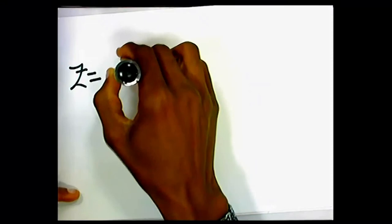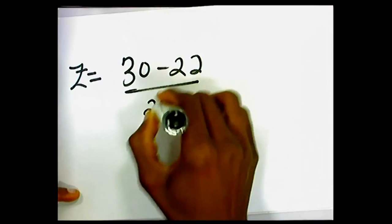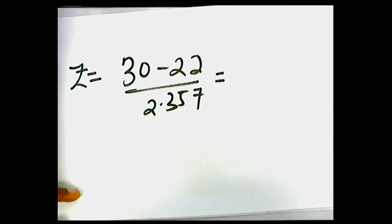So our z-score, so here it's going to look like it's 30 minus 22 all over 2.357. And this is going to give us 3.39. Now, what I really want us to consider here is what the question is asking. In fact, in reading the normal distribution table, what you really need is not necessarily the z-score. The z-score is a pointer to where to look for.